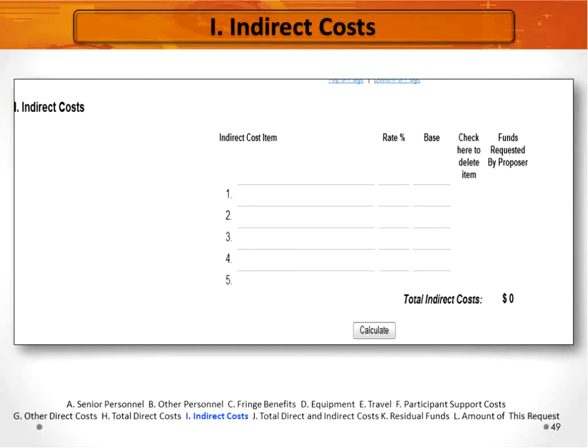In another situation, a community college discovered that they would be required to use their statewide community college system indirect cost rate of 54%, which had the effect of cutting the amount of grant funds available to run the project in half. This had a huge impact on their project plan, and they didn't find this out really early. So you need to figure out what your situation is as soon as you can on this, because it does make a huge difference. Reworking a budget to accommodate indirect cost is not uncommon.